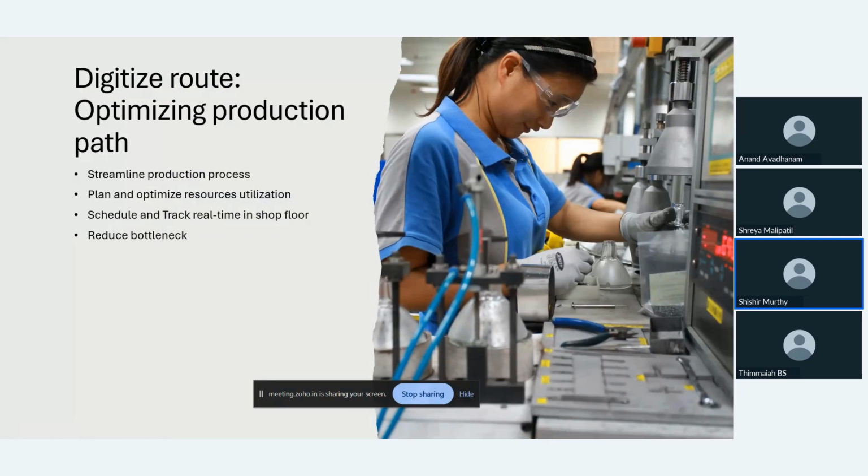So we saw how the capacity planning part of it was able to understand what capacity is currently occupied and what would be required. It's actually doing a back computation based on the due date. So if you change the due date, the computation would change, because for each step you would have defined the time taken for the operation, for the procurement, and the lead time that would be required, as we saw right now in the vendor part of it. So using all this data, it will do the computation.